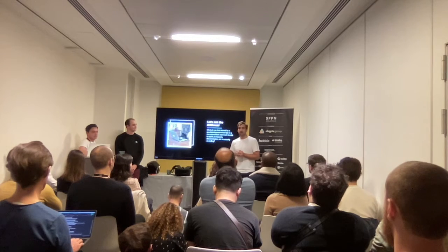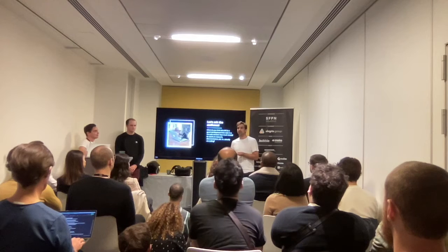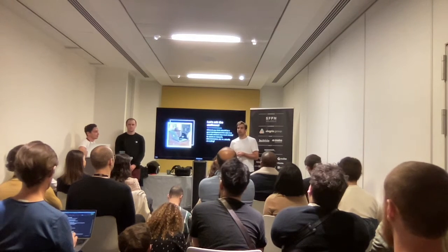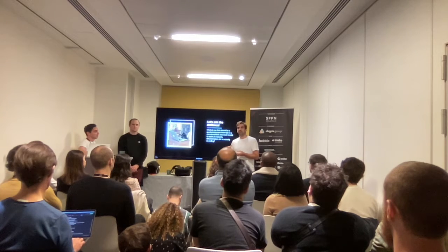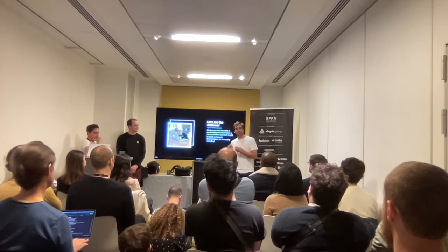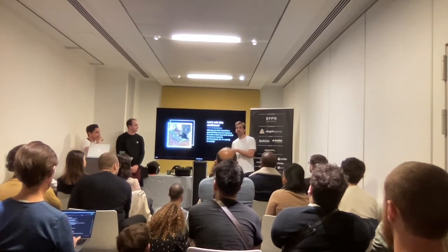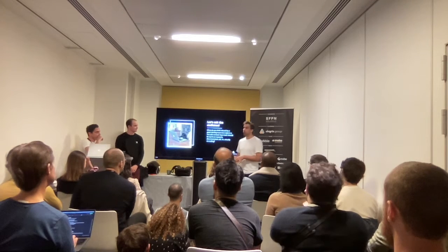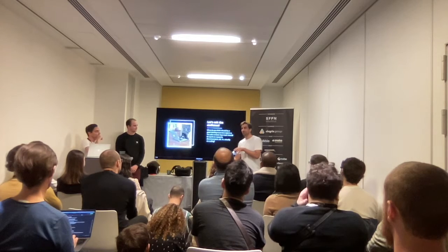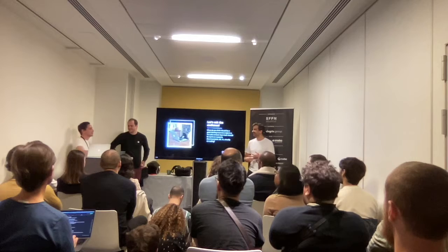At the end of the value engineering, you have one prototype, meaning you know exactly what your integration feature will do, and you have the written specification, where from this prototype you add all of the edge cases. In addition to this prototype, you need a strong QA plan. And once you have done that, you can start to already. You dumped a lot of info already on the crowd.